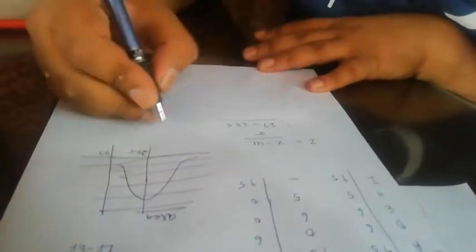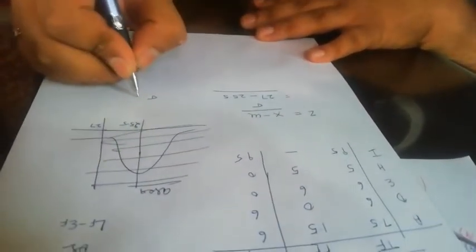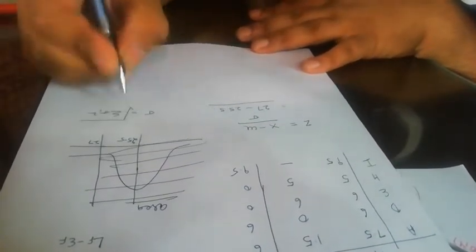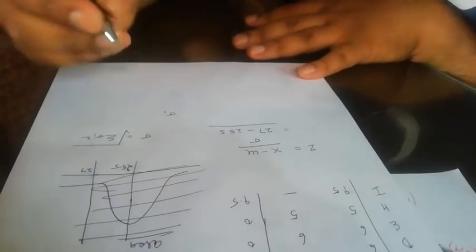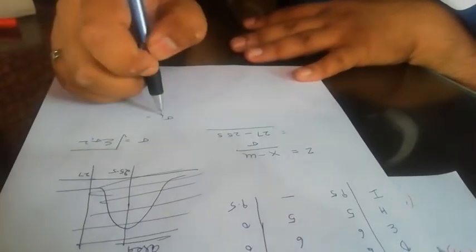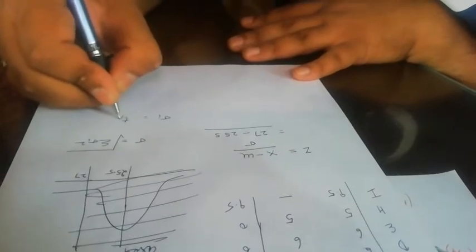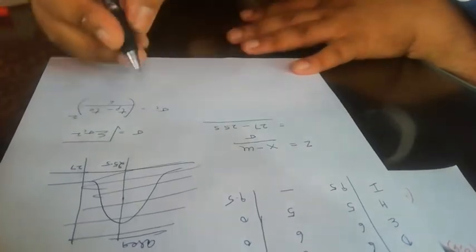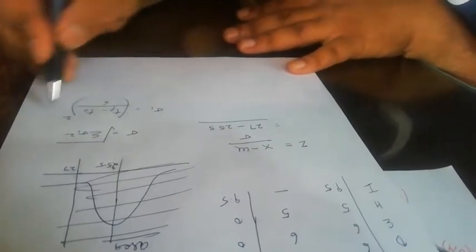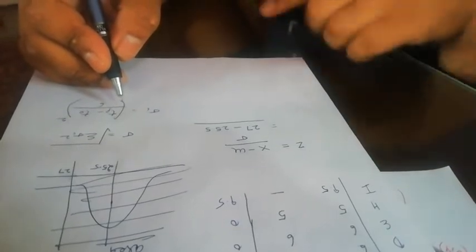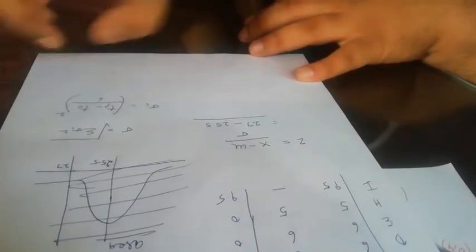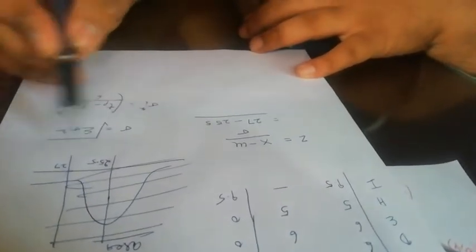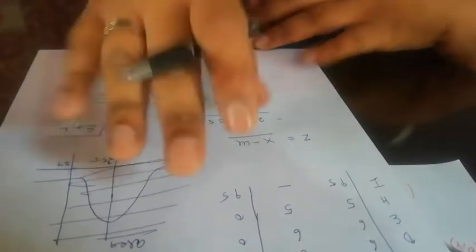You can calculate sigma by the formula: sigma is the square root of the sum of the sigma i squares. And sigma i you have to calculate only for the critical activities by the formula (Tp minus T0) divided by 6, the whole square. So sigma i becomes sigma 1, sigma 2, sigma 3, only for the critical activities. Then you add all these sigma i squares and take the square root of the same to calculate sigma. So we'll apply the same.